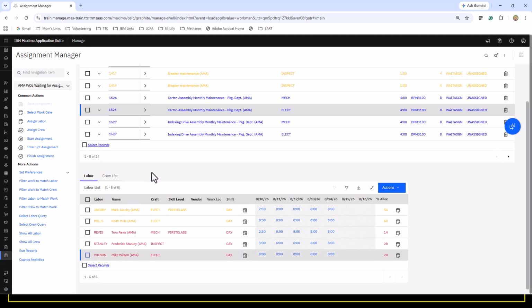The caveat to that is if you have work, like you need someone to go out and take a look at a job to see what it's going to take to be able to start planning it. So you don't have any durations in it. You don't have any planned crafts or anything. If you have a bunch of work like that, you can actually do those schedules as long as it doesn't have a specific duration, a specific craft, any of that stuff. It'll just put it on the people's schedule and they're considered an ad hoc crew. And you can do that, it puts them on for 1 hour. So it's a little bit complex.